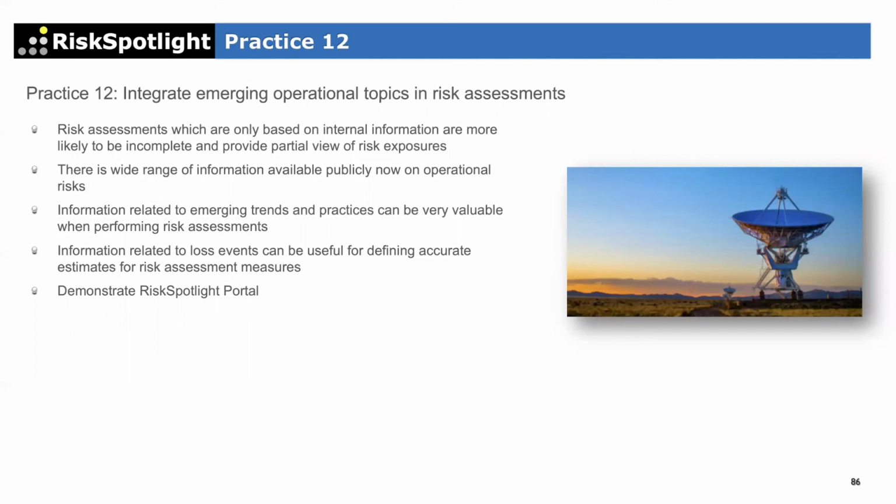But I need to also look at what's happening outside Barclays on online banking fraud, because maybe there is something else happening in another financial services firm or within the industry, which may inform my risk assessments. This is one weakness I've seen: a lot of the time, the risk assessments are just based on internal information and no external information.